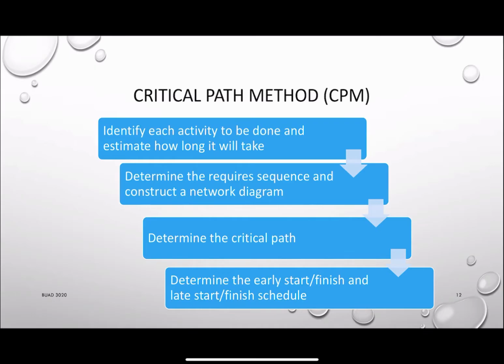But in reality, you don't need to go through the third step, because if you have a very large project, it will be very difficult for you to find all the possible routes from the start to finish and calculate the durations. And also, once you are able to calculate the early start and the late start, you know which activities are critical activities already, because we know by definition critical activities will be those with the slack time equal to 0. So the third step is kind of redundant and it's not very useful when you have a very large project.